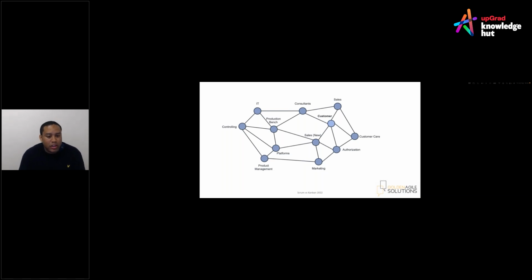So you can literally go back to basics and say this item will take 1 day to work on, or this item will take 5 days to work on. Or you can say it's a small, medium, large in terms of effort, or you can say 1, 3, 5, 8, 13, 20, with 1 starting at your lowest number.